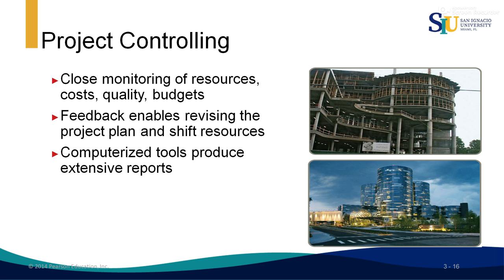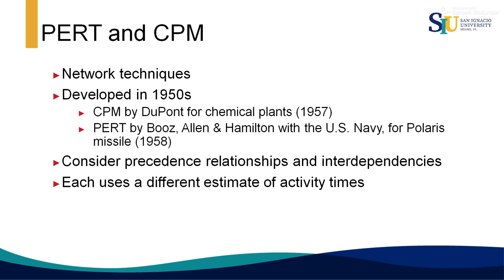For instance, if you are building a construction and you are 1 week or 1 month delayed, then you would like to shift resources and maybe assign new crews and people to certain areas that are delayed. But in order to know that they are delayed, you compare the planned situation to the current situation and look for deviations, and there are several tools for doing that.